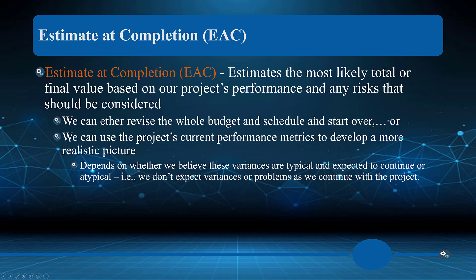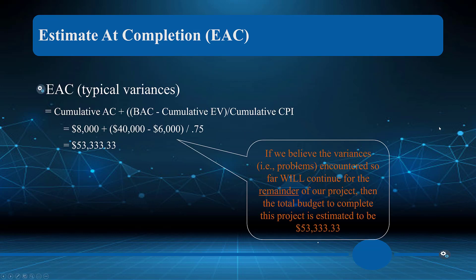Estimate at completion (EAC) is the most likely total or final cost based on the project's performance and any risks to consider. We can either revise the whole budget and schedule and start over, or use the project's current performance metrics to develop a more realistic picture. If our CPI is 0.67, we can apply that throughout the project to figure out the true likely final cost.